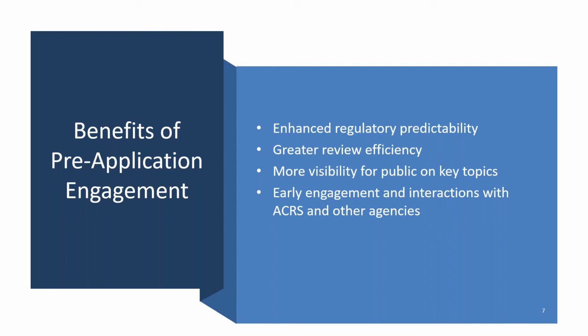So by engaging with ACRS even prior to the application, we can put these items forward in front of ACRS, so that when the time comes for your application to be reviewed through ACRS, they're already aware, they already had a chance to weigh in on some of your design aspects of your proposed facility. So next slide, please.